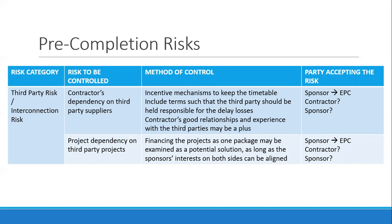Another risk category is third-party risk or interconnection risk. The risks to control are the contractor's dependency on third-party suppliers and the project's dependency on third-party projects. To control this, there must be incentive mechanisms to keep the timetable — for example, providing a bonus for early delivery — which motivates contractors to ensure third-party suppliers deliver on time. Another method is to check the contractor's relationships and experience with third parties.